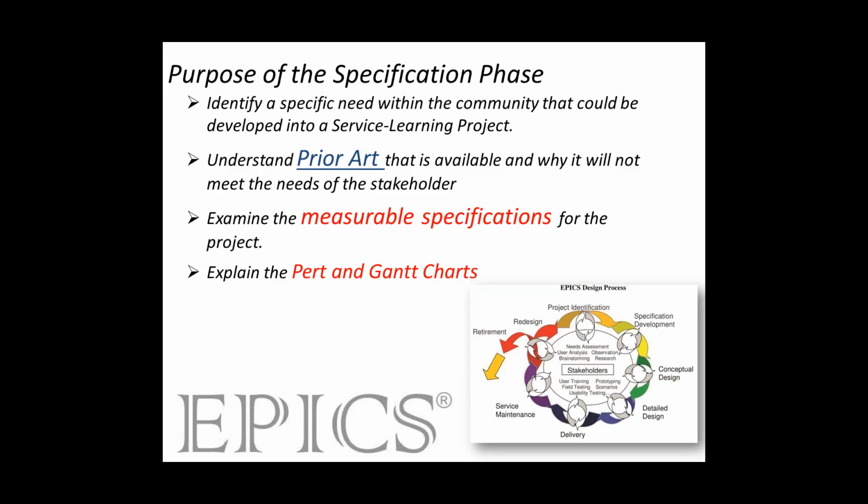Oh yeah, I've used both PERT charts and Gantt charts quite extensively, a lot through Microsoft Project. PERT charts give you the main steps, the phases in the projects. It helps you with the critical paths. Great. So when several different threads of activity are happening at once, you can see points where they all come together and meet.